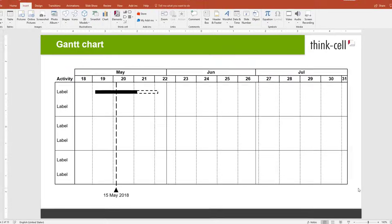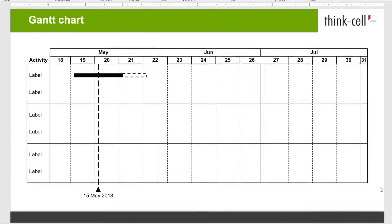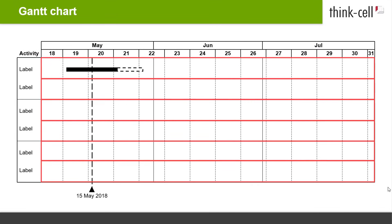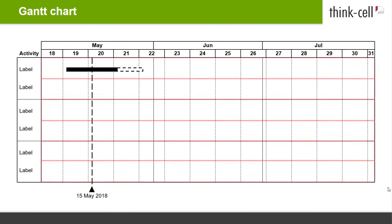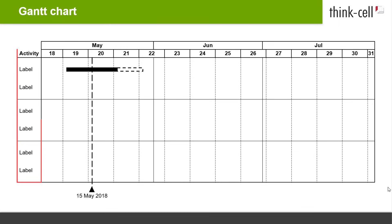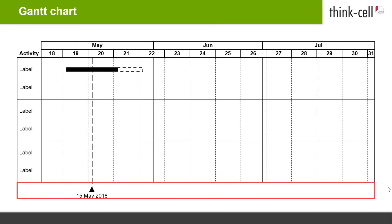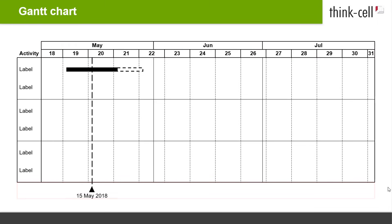A newly inserted Gantt chart consists of activity rows, an activity column on the left to label the rows, the scales at the top showing the chart's date range, and finally a milestone row at the bottom. The default chart also displays an example activity bar and a milestone.